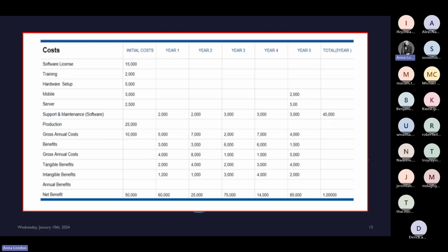This is another example, looking at a piece of software we're going to include. So we look at the software licenses. Sometimes it's $8 per user, or sometimes the only thing they'll do is a minimum buy of like 100. Sometimes they won't go any less than like 10, or even less than 100. Sometimes it's enterprise only. Is it an enterprise license or a per user license, per seat?